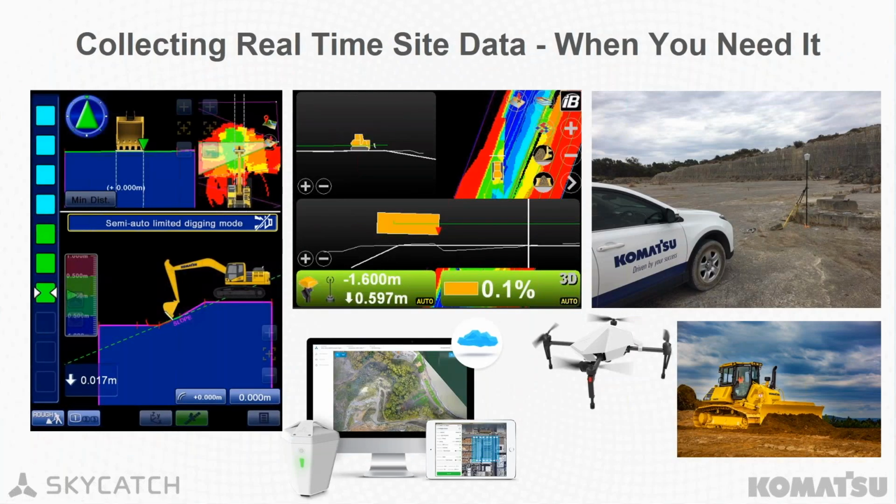We can all collect data one way or another. The challenge we all face is collecting site and project data and having it delivered to the people that need it on the project to make timely decisions throughout the entire life cycle, from beginning to end. This data needs to be collected quickly, and the output needs to be usable, accurate data. Komatsu IMC machines collect as-built information from active working areas every 30 minutes, which is delivered to the SmartConstruction cloud server and usable by the project team instantly.